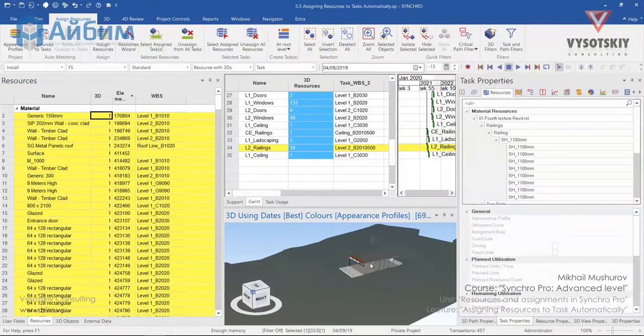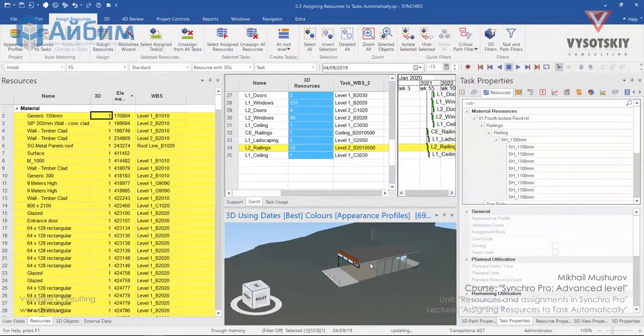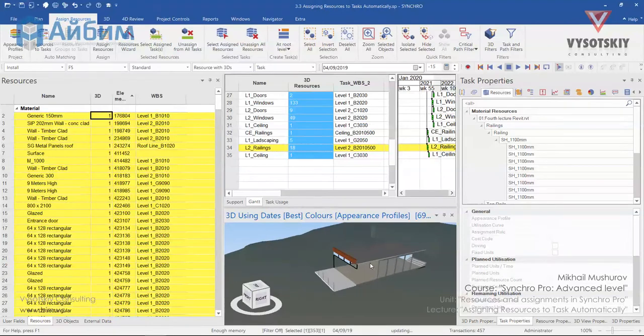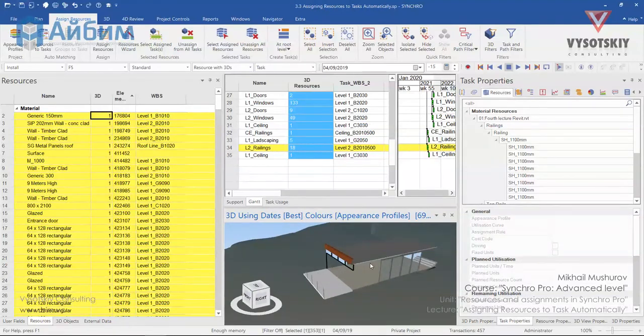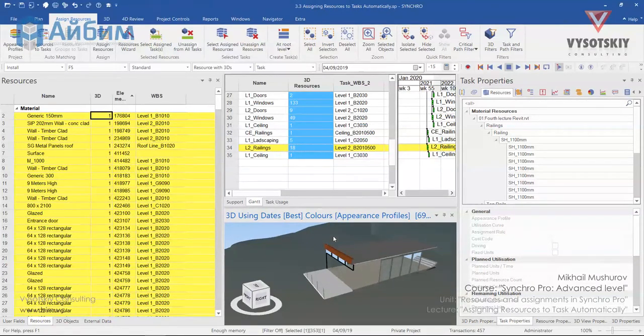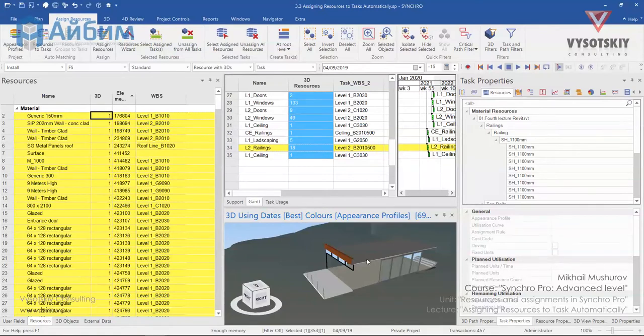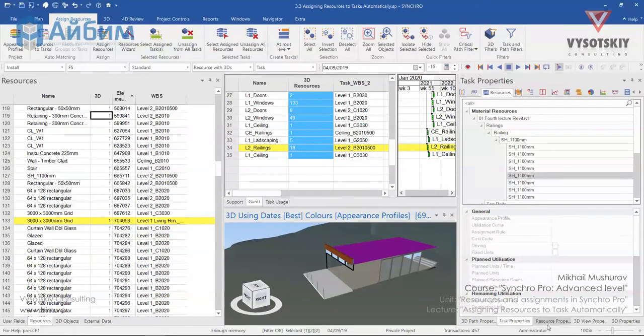But we still have some unassigned elements on the 3D view. This means that for these objects, no matching activity was found. Let's click over this object and see its VBS code.